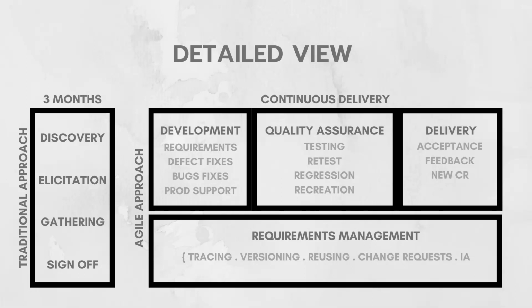Now, once we have gathered enough information about that particular project, we start to translate those high level requirements, which would essentially be in the form of business requirement documents, supported by the functional specification, supported by other artifacts like UML, use cases, UI screens, process flows, whatever artifacts. We start transitioning them into user stories. This is where the agile approach starts. Now, in the agile approach, we give all the user stories to the developer as requirements.